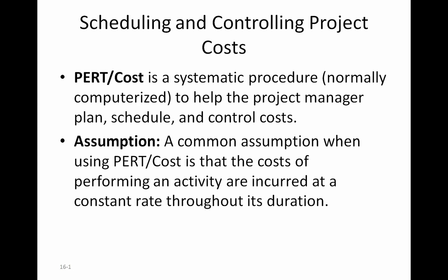So that's the CPM. Whereas PERT depends on each activity having a distribution for how long it can last. So we know the optimistic time, the most likely time, and the pessimistic time, and based on those, we take the mean or the average time and go through the project and identify the critical path. From your homework and earlier discussions, you know how to create a precedence network diagram and calculate early start, late start, early finish, and late finish times for each activity, then compute the slack on those activities and identify the critical path.